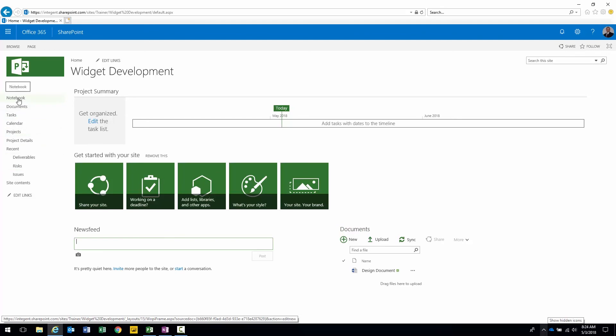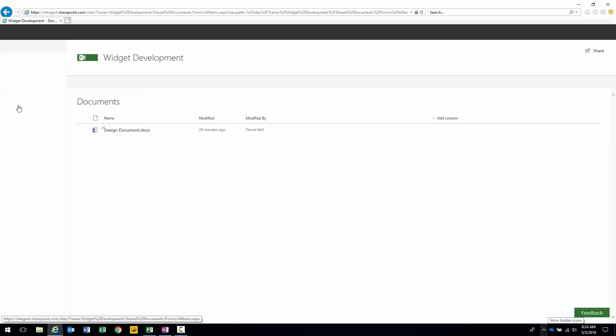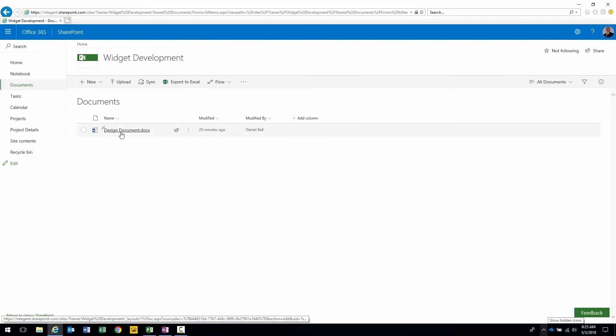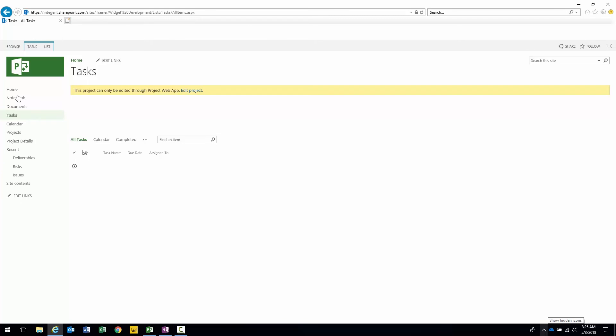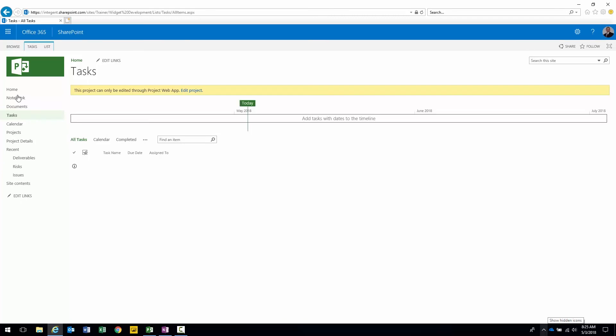OneNote notebook, great product if you don't use it. There's one on every project site. There's my document library. I already have a document in there. A task list. This task list is automatically going to populate with the tasks in your project. You're going to add them into your project. If you specify the sync process within your EPT the tasks will automatically show up here. As they're completed, meaning 100% complete, the tasks will get the strike through to show they're completed.